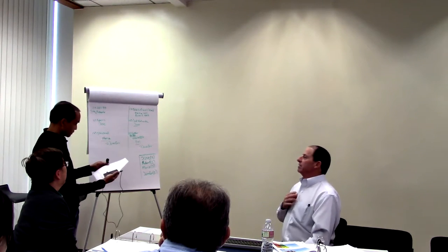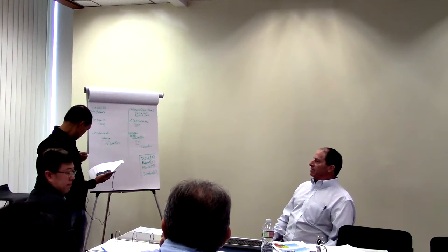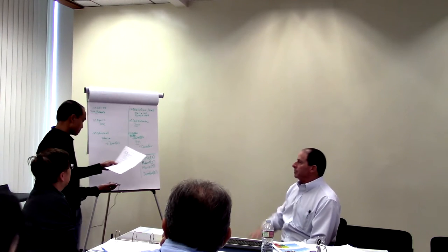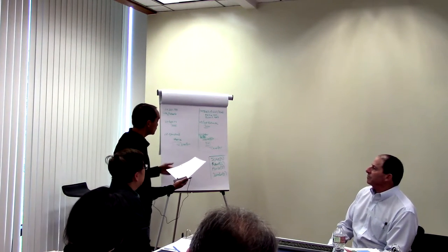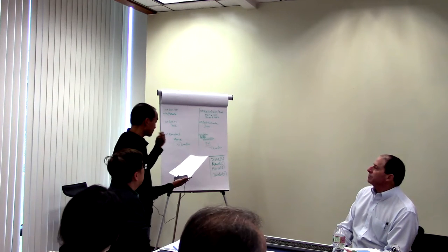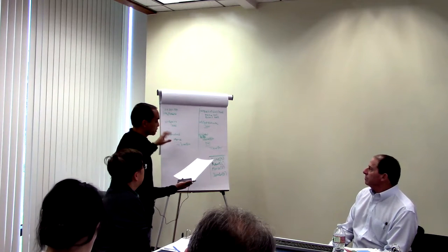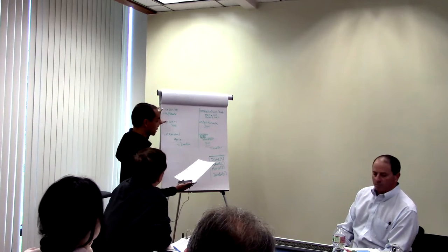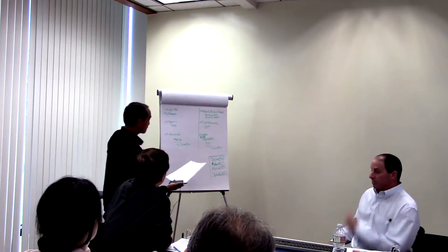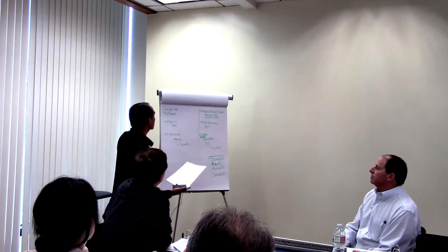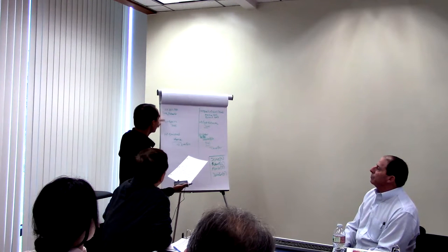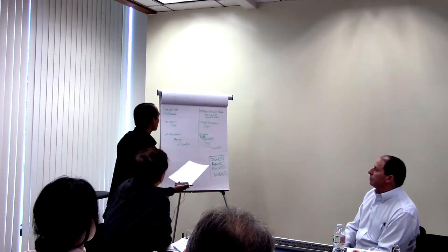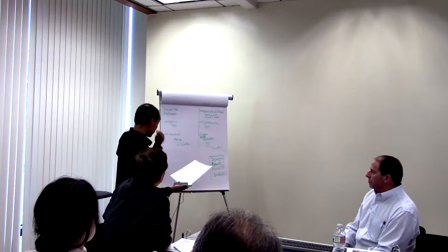So, first off, our team missed the last paragraph there where you need additional help. Now that I'm looking at it, I think we will definitely need some kind of help. But assuming that the project manager is an expert in either civils or structures, we will assume that he's technically adept in either one of them. Let's say civil. So, having said that, for 60% design development, we put Jose as the task lead. Also, he's the lead on the specs and the cost estimate, because we figured the plan, specs, and estimate should all mesh together, so it should be led by one person.